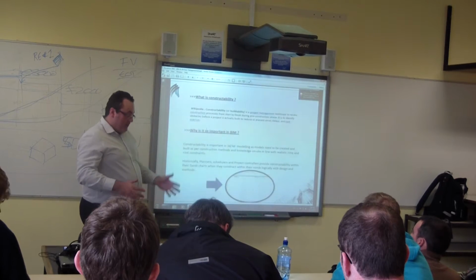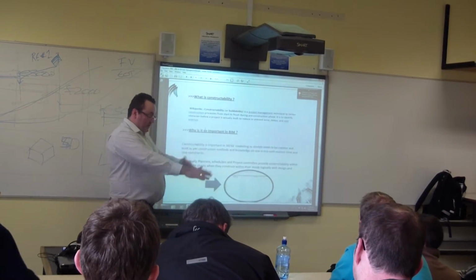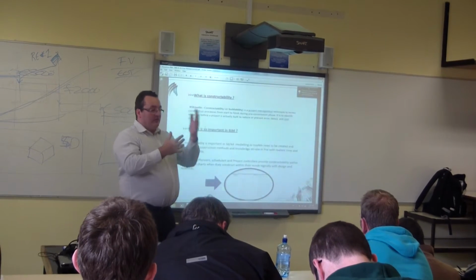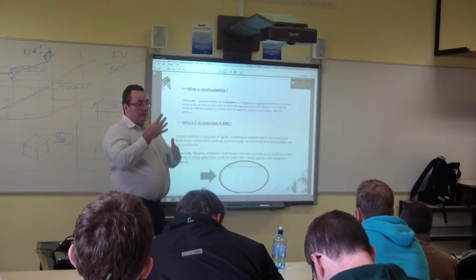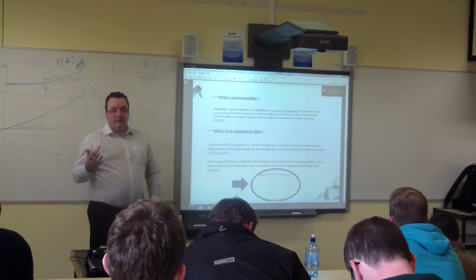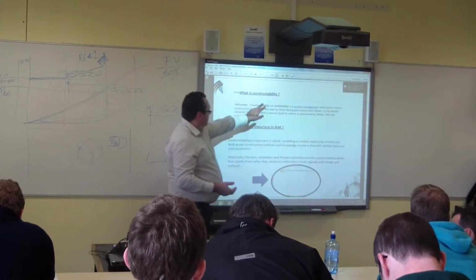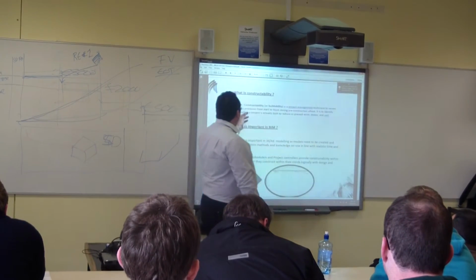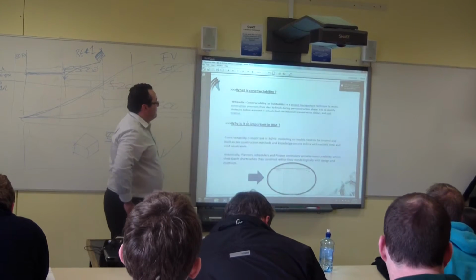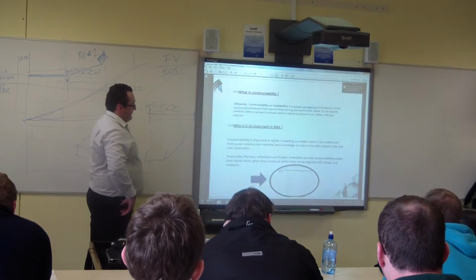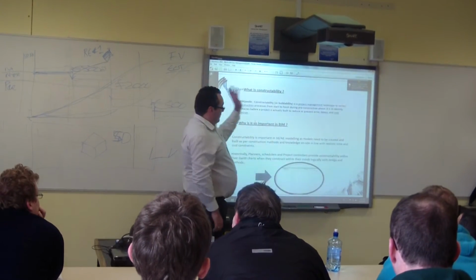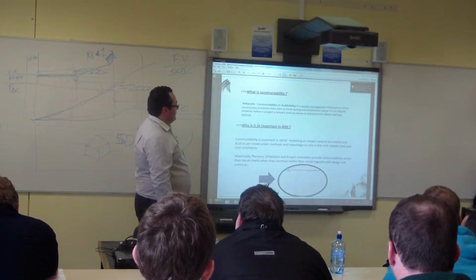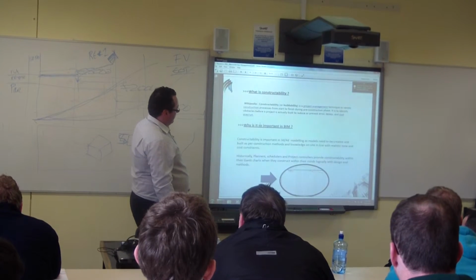Constructability is basically taking a concrete slab and then splitting it up, whereby you can have different materials interacting with other materials. It's called problems like vapor problems, condensation, that sort of thing. That's buildability, right? That's wrong, Wikipedia. Well, I think it is anyway. It says it's a project management technique to review construction processes from start to finish during pre-construction phase. It isn't actually. It's during all the construction you have to do constructability. It is to identify obstacles before a project is actually built to reduce or prevent error, delays, and cost overrun.